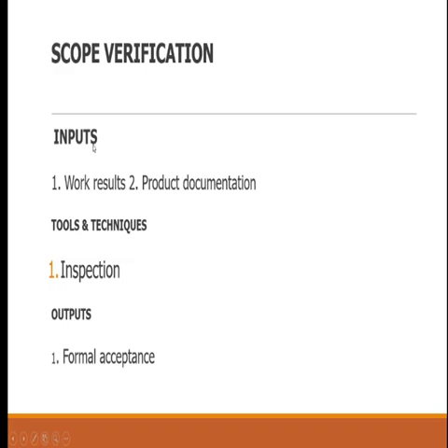So input to verification: 1, work results, check what has been done. 2, product documentation. Is there any diagram or any design that shows what the result ought to look like? Then you can do a benchmarking. You compare between what was done and what ought to be done. So let's look at the tools and techniques.